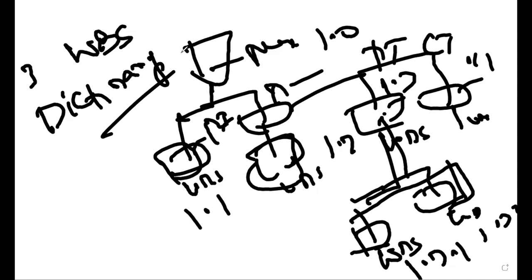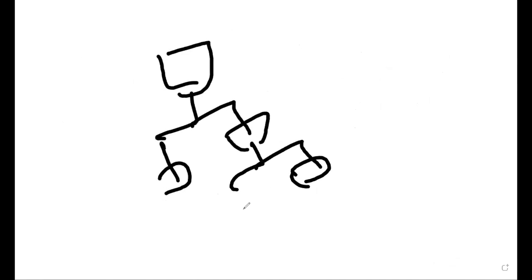You are getting the scope statement approved. That is the first document within the established scope baseline. The second document is your WBS, where you bring out the hierarchical structure and exhibit your complete project to the sponsor to get buy-in support. And the third one is your WBS dictionary. Is it clear or not, guys? Yes. Okay, clear. We have the WBS. This is a major deliverable, and we are breaking that into more minor levels, right, for our convenience.